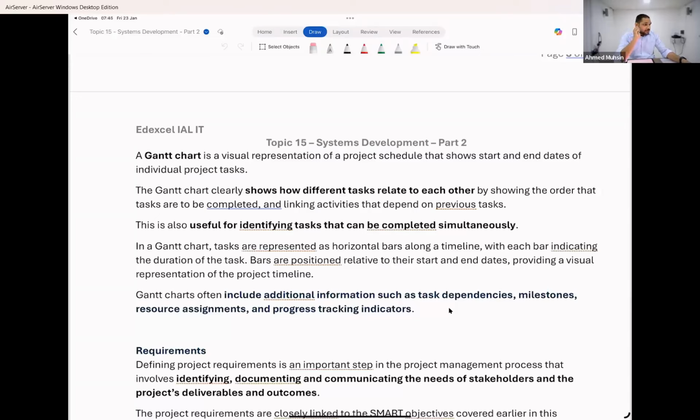So for example, designing of jersey and booking of grounds, can they both happen together at the same time? Because the person who's handling designing of jersey will obviously have nothing to do with booking of the grounds, isn't it? So for example, when it comes to a football tournament, before that we need jerseys and we need a ground to play at, right? So booking the ground or researching on the best ground to play in, and designing of jerseys for the players, those two tasks can happen simultaneously, isn't it?